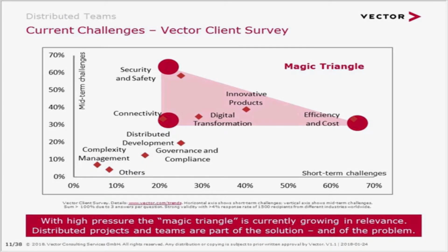Just to give you one number, which I think makes a lot of sense if we think about efficiency, is that typically distributed team, which is on about 2 to 3 sites, has about 30% of additional cost, which is typically not visible. If it is visible, that's mostly in situations just before such project crash. But there's overhead, and we should not close our eyes in front of that.